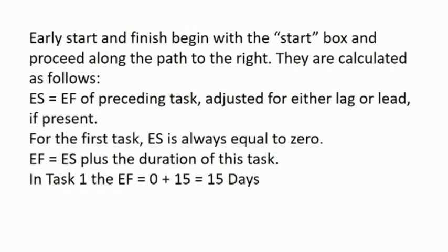For the first task in our diagram above, earliest start is always equal to 0, while earliest finish is calculated by adding earliest start plus the duration.